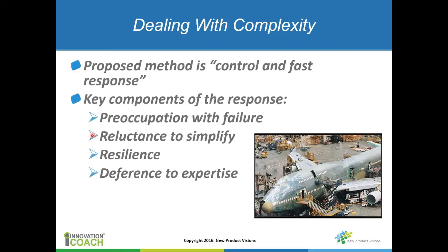For instance, let's say you're testing multiple prototypes and for whatever reason one of them is an outlier from a performance standpoint, and you rationalize the reason for that and don't really get to the root cause of that. In my experience, when you do that, it will come back to haunt you later in the project, because there's probably something that you don't understand that's going to influence the success of the project long term.